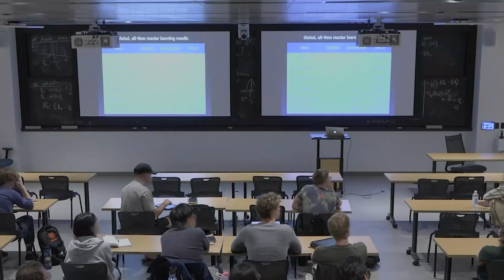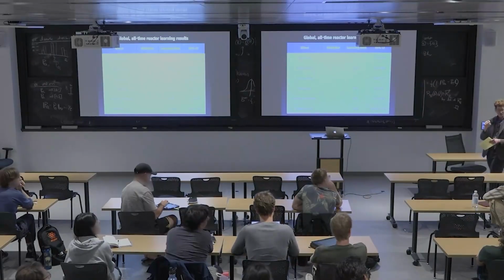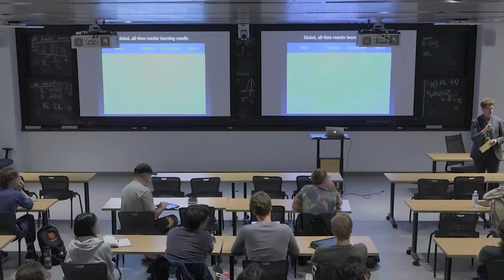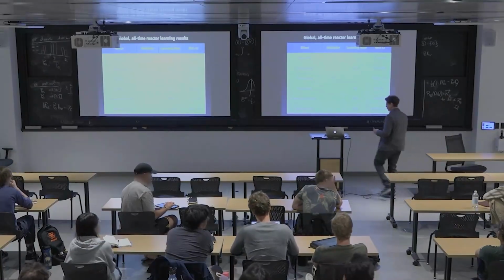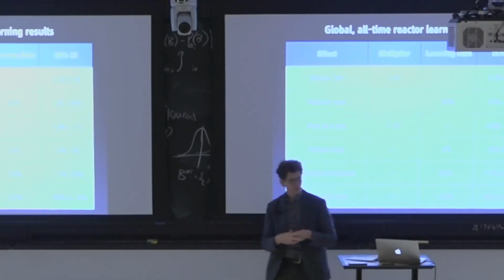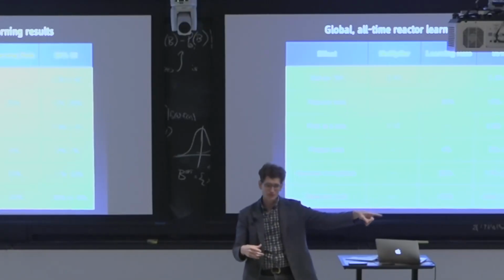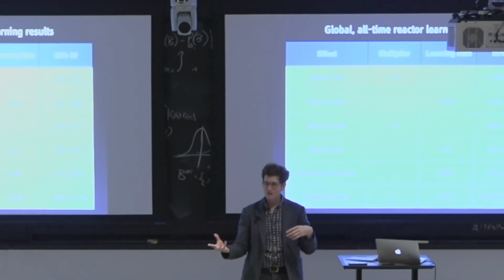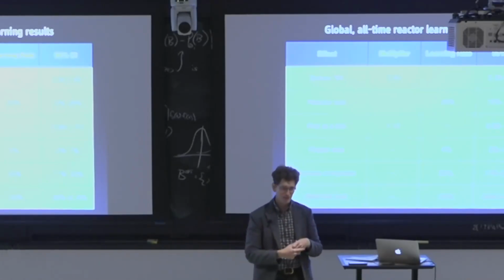So on a per kilowatt capacity basis, the fact that we've gone small, we would predict would increase the cost by a factor of 2.5, roughly. And so NuScale has to make up, these small modular reactor concepts have to make up that loss of cost reduction somewhere else. And the place they hope to make it up is in factory fabrication. And we'll have a lecture on whether they're getting there or not.